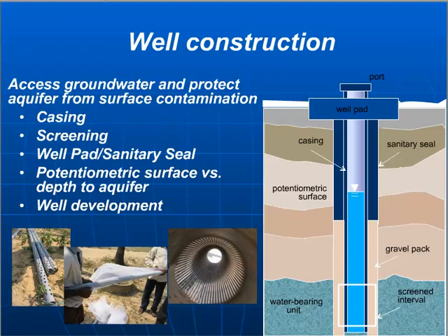They don't know if maybe after it was installed and during the development process, when you're pumping a bunch of water to make sure that you're pulling the true clean water from the aquifer, maybe it wasn't developed properly, and they just don't know because no one was there and the driller is not cooperating after the fact. And so having that oversight is just so important so that you don't find yourself in that same situation.